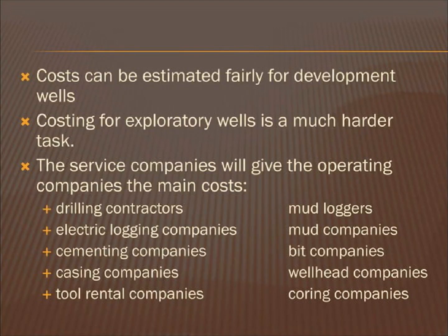Estimating the cost of developing new oil and gas wells is generally achievable with some accuracy. Conversely, when calculating the cost of exploratory wells, it is much harder. This is because many different service companies must be taken into account, and each involves varying expenses.